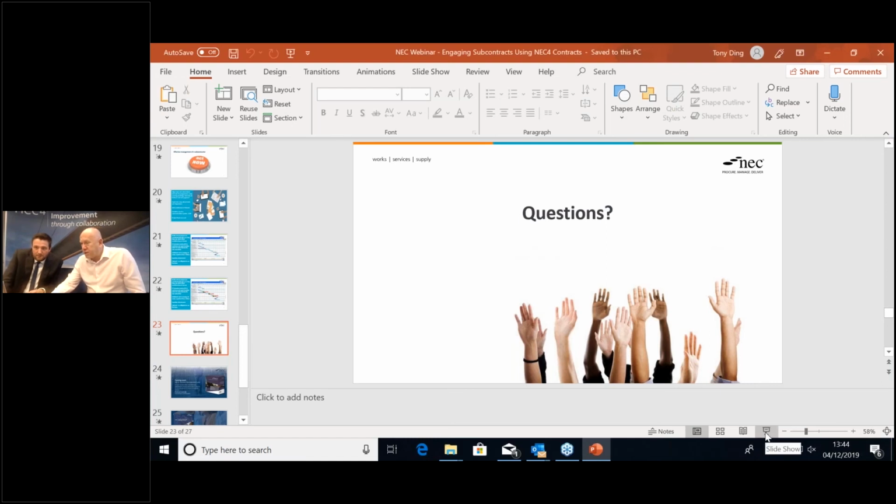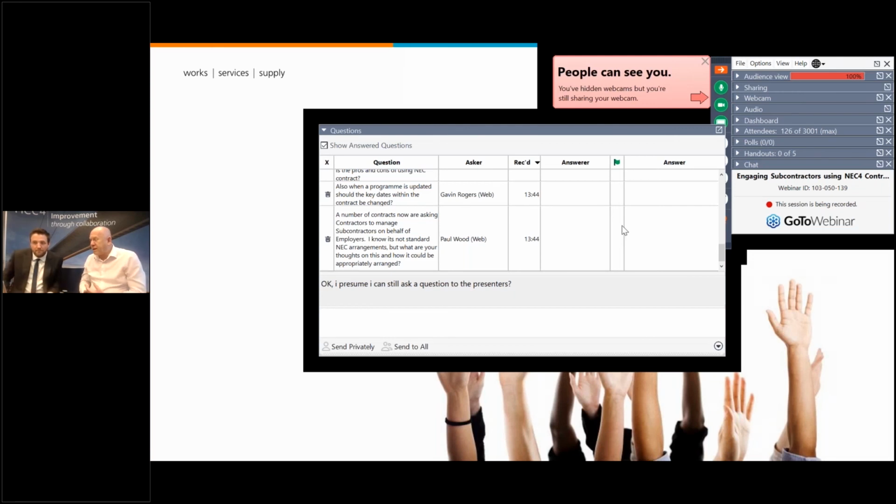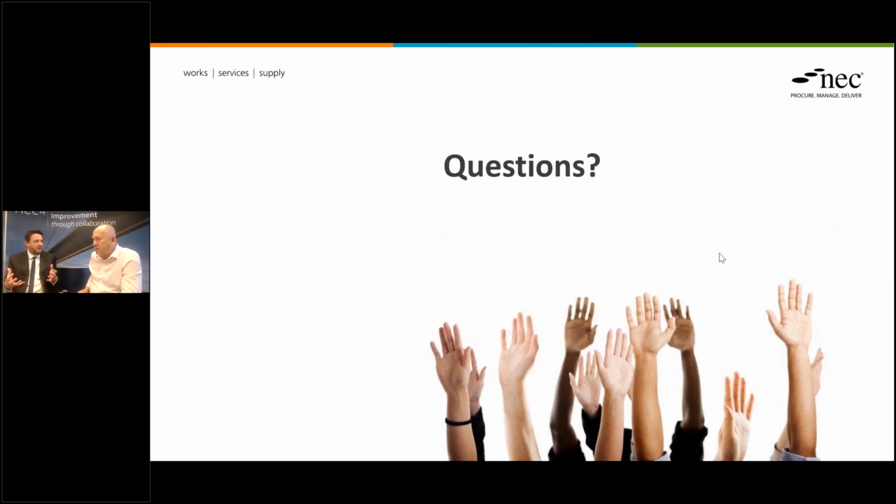How does, bear with me, how does the contractor under ECC4 engage a designer? So you suggested a professional service subcontractor, not a professional service contract. So the professional service subcontract is better written to be used as a subcontract rather than the PSC, which is a head contract. Yeah, so it's still the PSS, still the professional services subcontract. It's just that the parties under that align a bit easier. It's still otherwise ostensibly the same as the PSC.